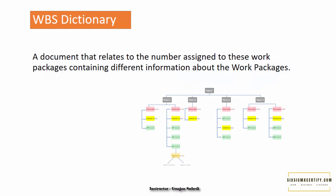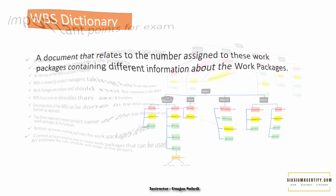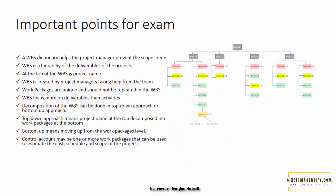Let's discuss important points on the WBS that could be beneficial for the exam. The WBS dictionary helps the project manager prevent scope creep — things moving beyond what the project requires. The WBS and WBS dictionary are created by the project manager with help from the team. The WBS is a hierarchy of deliverables of the project.